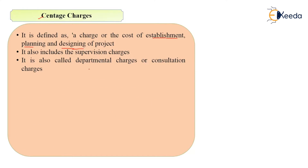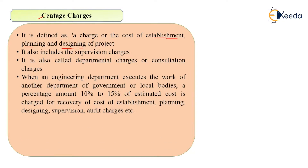These are also called Departmental Charges or Consultation Charges, and nowadays they are also called Project Management Consultant Fees. When an engineering department executes the work of another department of government or local bodies, a percentage amount of about 10 to 15% of the estimated cost is charged for the recovery of cost of establishment, planning, designing, supervision, and audit charges.